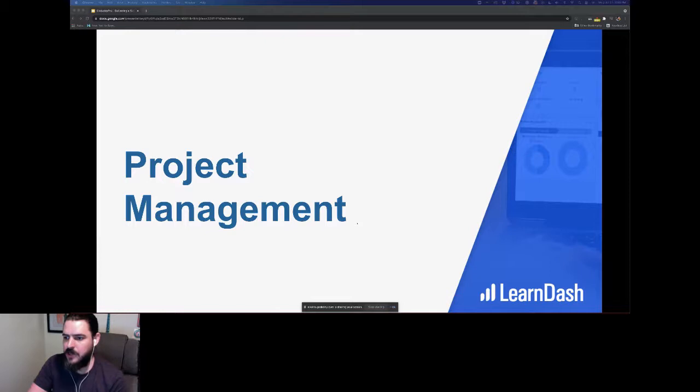Okay, project management. We've completed the onboarding call with the client. We've had 1 or 2, probably close to 4 hours worth of conversation, recorded meetings. You've taken all those notes. Now it's time to break all that down into an Asana or a project management system somewhere. I personally use Asana. I break the project down into 1 to 3 projects.